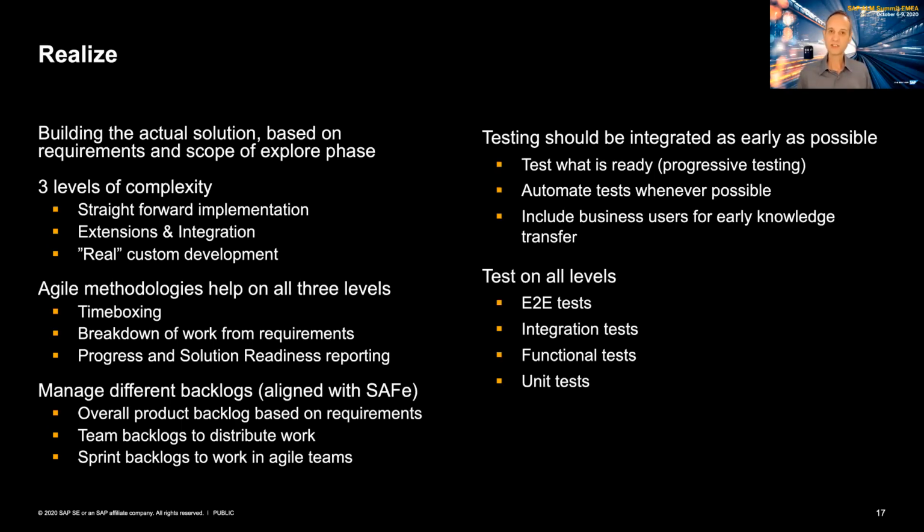So these tests on all levels are really important and need to be done in the realize phase, need to be set up because they will also help you later on when the solution is live. So when the solution is live, you can use the E2E tests and the integration tests also for regression testing activities. And the realize phase basically is the foundation for that. And as I said, it's on all three levels: the straightforward implementation, the extension and integration projects, and the real development projects that you actually do. And depending on where you go, that's then the decision in a hybrid world, which tools you use, for which purpose, and how you integrate them.